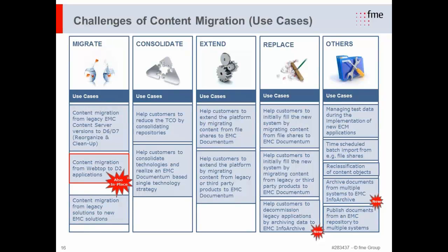At last, I just would like to highlight a few more capabilities of Migration Center for you to be aware. So, it supports delta migrations. That means that data can be migrated while the source system is still in use by the business. So, after an initial migration, delta migrations can be executed to only read the data that was changed or newly created since the last migration. And this we can repeat multiple times until the final cutover window is reached, when the system will be shut down for the business, and then the final data will be migrated to the new system. This drastically reduces the required downtime.